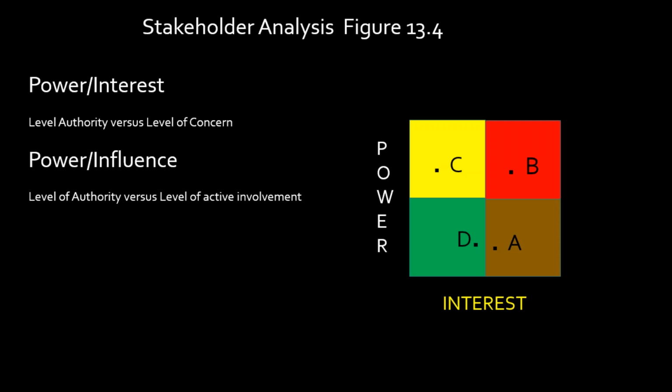So when you're building your stakeholder register, you grab one column as an x-axis and another column as a y-axis, things that mean something to each other, okay? So that the logical relationship between the two will tell you something, like power and interest. I want my most powerful stakeholders to have the most interest.